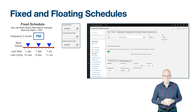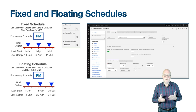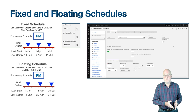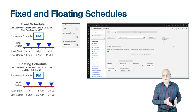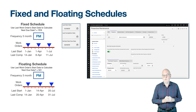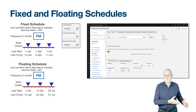If 'use last work order start date to calculate next due date' is not set, a floating schedule is created. In this case the first target start date is 1st January, but Maximo uses the actual finish of the work order — in this case 14th January — to set the target start of the next work order three months later on 14th April. The next work order is due to start the time frequency after the last work order is completed. If the next work order is completed on 23rd April, the next target start will be 20th July — 20 days later than with a fixed schedule.